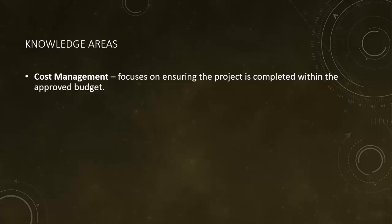You're going to need to be able to do some cost management, right? If I have a budget of X dollars, I probably have an initial plan where I say I'm going to spend Y of those dollars doing this and Z of those X dollars doing that. But what happens if early on we go over budget? How do I essentially make up for that in later things? And it is always possible you need to go back to the stakeholders and say, something changed, and so we need to renegotiate the budget, right?